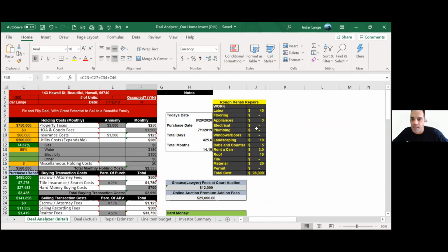I just pick out the big costly items for us. Permits, materials, another huge costly item. So I'm just pulling out the huge costly items. And if you can work with a contractor, I have a contractor's background. So if you can work with a contractor and just work with a labor cost with him and you cover material, you have a huge savings, because that contractor is going to mark up your material. He doesn't know what you're going to get, so he's going to have to mark it up to make sure he covers his butt, because some items may cost different.